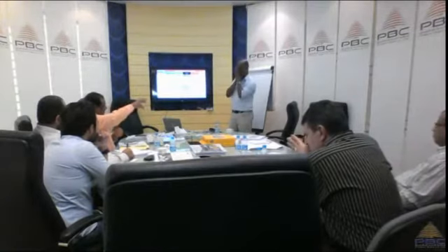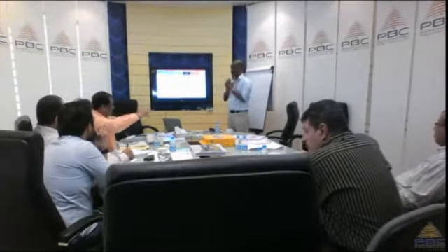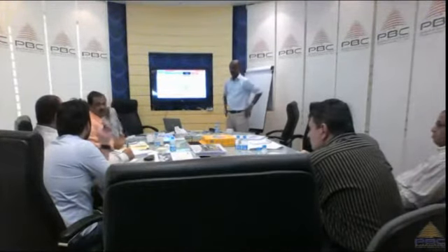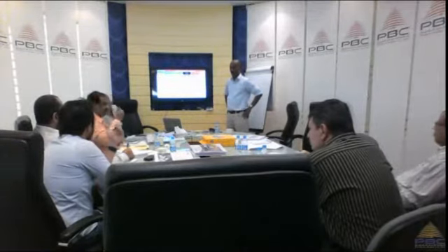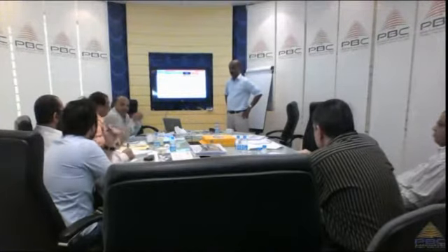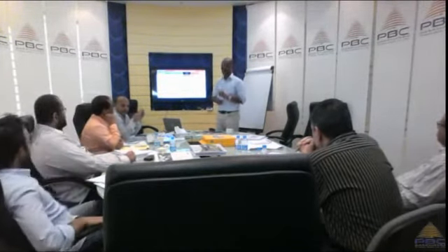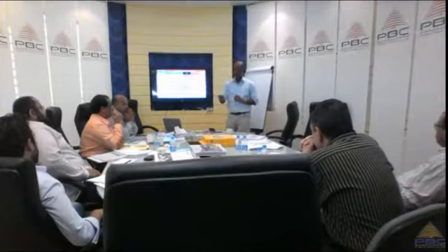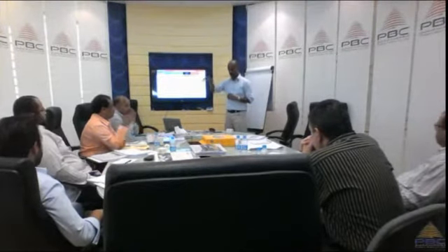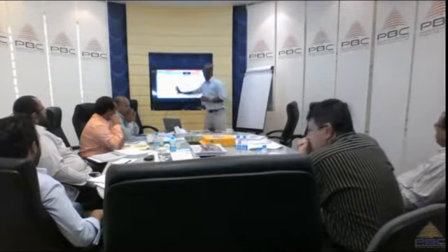This will affect the changes in the procedure. You don't only update the schedule, you also update the probability of the risk happening, because the risk concept also changes according to the new schedule. For example, if you have major delays in your schedule and you realize this delay will have a further impact on the risk, maybe you have a new risk appearing. So you end up updating everything.